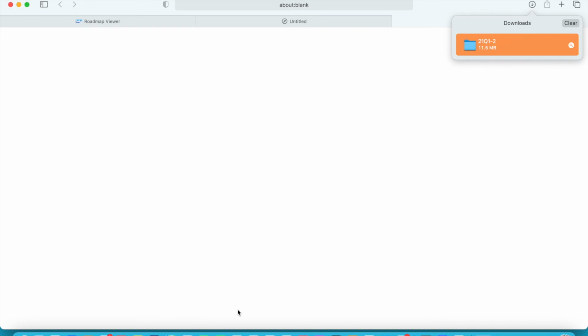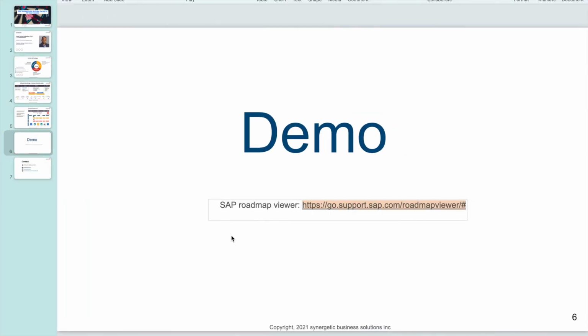So the list of activities for implementing SAP is already out there for you. But if there is something else which is not listed in the Activate processes, but you need to do for your implementation, go ahead and include that in your project plan and plan your activities accordingly.